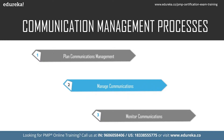The project manager will face challenges if not sensitive about these communication aspects. When monitoring communication, frequency, content, objectives, and templates can be checked against the plan — but the qualitative aspects are harder to measure. Communication management is very important, as 90% of the time the project manager spends is in communicating throughout the project life cycle.